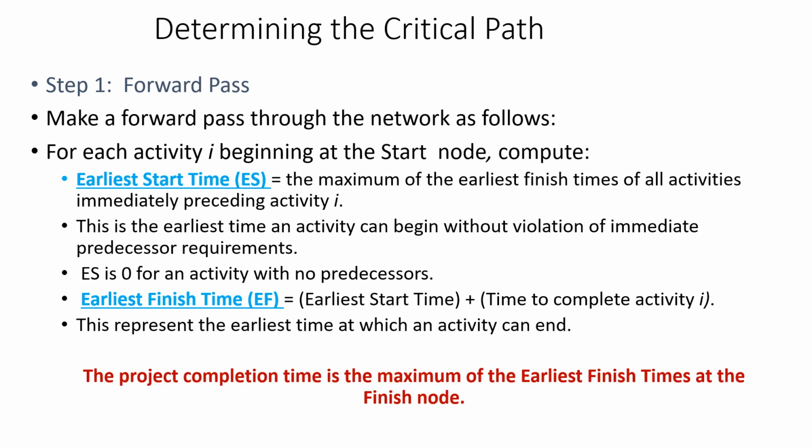What is the project completion time? The project completion time is the maximum of the earliest finish times at the finish node. So the project completion time is the maximum of all the earliest finish times at the end node of the network.